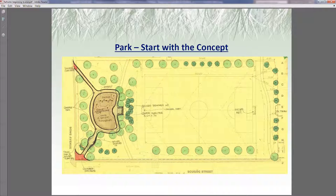I'm going to move into an example of how we do this. This is an actual park we're working on in Ontario. Just like every other project, you start off with a concept. LandEffects does have concept graphics and we use those for some projects, but for this project and most simple parks, we like to actually start off with a hand sketch, full scale, so you can scale it, draw it all out, and send it to the client so they get a feel for the space and can offer comments right from the beginning. From this we usually do a rough costing.